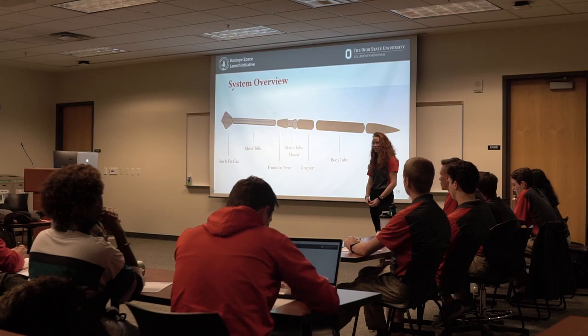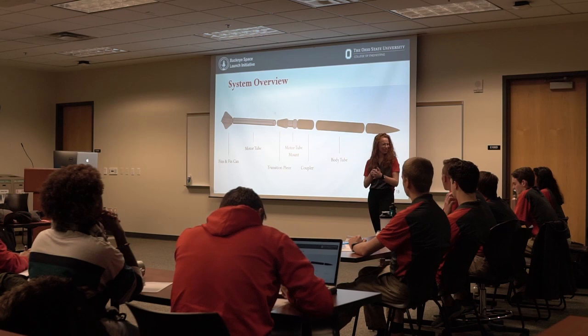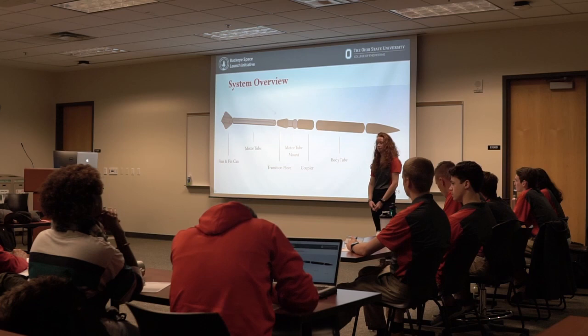So a lot of the time it's ordering and realizing we don't have something and placing the order, but then it takes a few weeks to get there. Other reasons have been parts came out and they didn't come out the way we wanted them to, so we had to remake them maybe once or twice in some cases. Things like that. There are probably a lot more scenarios, but those are just two examples. Have you built time for that in your schedule? Yeah.